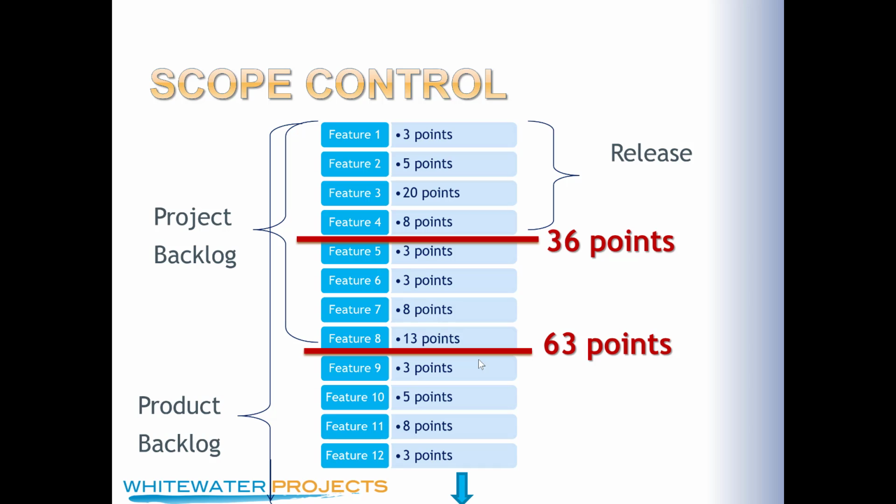But those of us on the delivery side need to make sure that we are asking that question. It's the product owner's responsibility to make that decision, but it's your responsibility as a delivery team to make sure the question is asked: hey, what do you want to do? There's a joint ownership of this backlog, so you need to be in conversation. Sometimes I've heard teams just complain that they keep jamming stuff into the release. Well, did you ever ask them not to? Did you ever tell them, that's cool, we can do that, here's the impact of that, it's going to change this? Whenever I've done that, with the empirical evidence of your actual velocity calculated against the story points in the backlog, there's really no arguing with it.